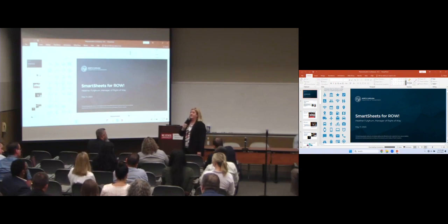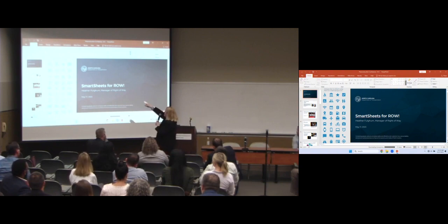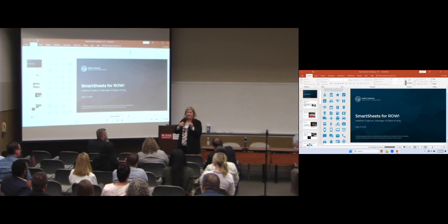Any relocation, you check relocation, there's a relocation subsheet that will populate, and you can put your information in there. And once you get to the end of the sheet, it will actually ask you, have you demoed the buildings? What's your demo date? It'll ask you that so that you can actually close that parcel, not just by settling it, but by demoing that building.